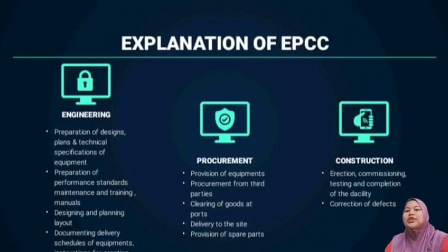Procurement. The first is provision of equipment. Second, procurement from third parties. Third, clearing of goods at ports. Next, delivery to the site. And the last one, provision of spare parts. The last one is construction: construction, erection, commissioning, testing, and completion of the facility. And the last one, correction of defects.